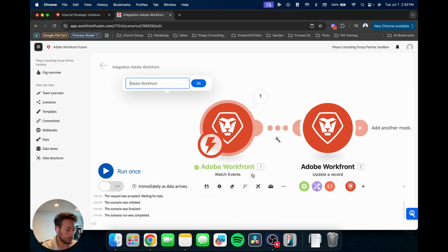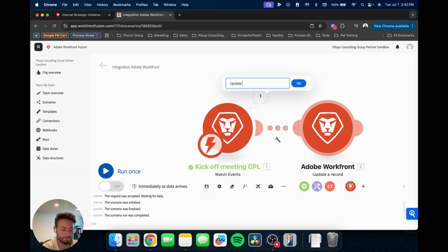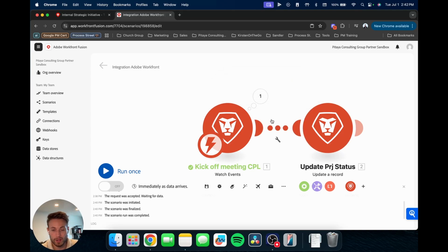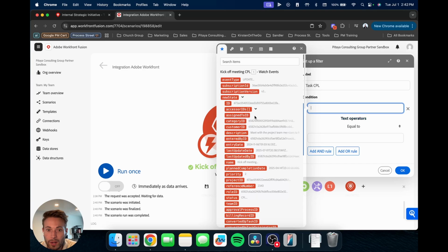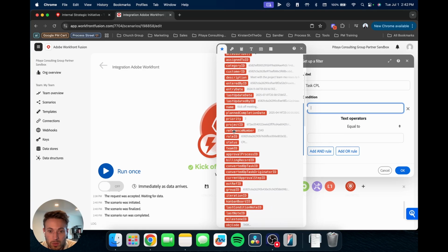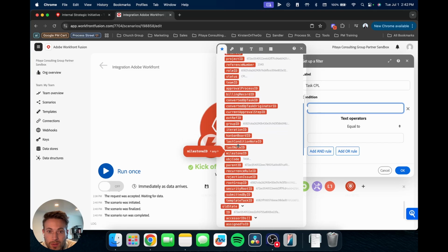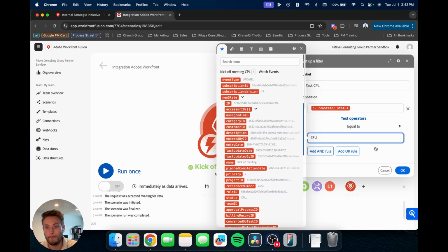Let's just rename these. So I'm going to say kickoff meeting complete. That's what's going on here. This is going to need to be update project status. And then I'm going to do one more thing just as kind of a safety measure. I'm just going to add a filter here for the task status. So again, for that first module, we'll need the status field, that's it right there. So status is equal to complete.